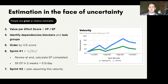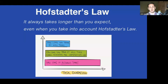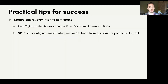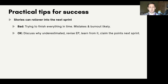What is your velocity? For a team of two people, maybe 60 effort points in two weeks. Do take into account Hofstadter's Law: it always takes longer than you expect, even when you take into account Hofstadter's Law. Moving on to some practical tips and tricks from the last 12 months of me trying this as a total newcomer. Stories can roll over into the next sprint — if you haven't finished something, just roll it over. Don't try to get your team to finish everything in time. Communicate upwards carefully, and understand that things change. Bugs happen. Data science is literally research and development. Allow for that uncertainty — don't make your teams burn out trying to hit sprint deadlines. Discuss why your teams underestimated, revise effort points going into the next sprint, and learn from that.